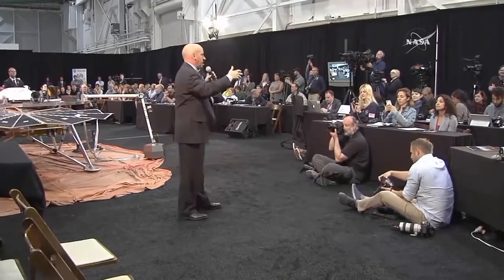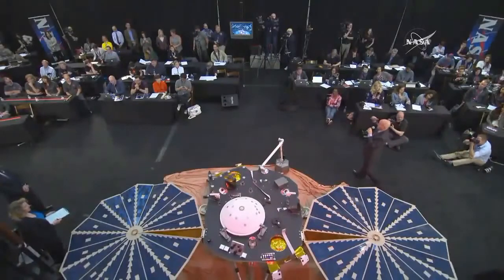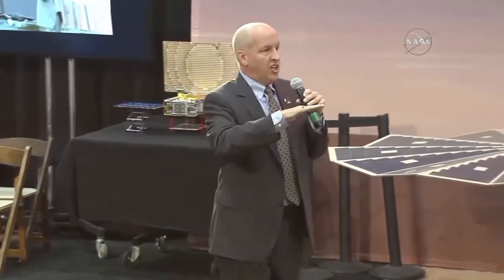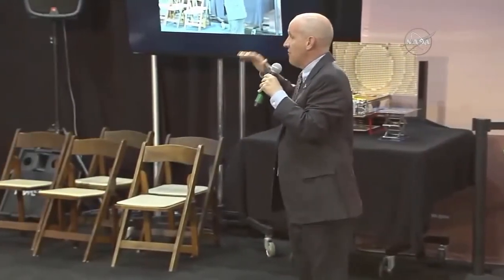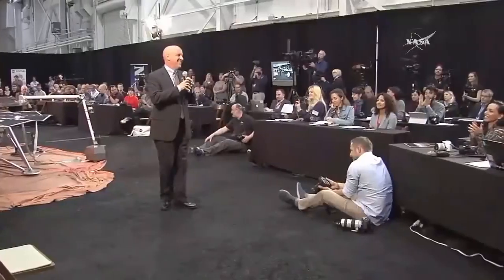So what have we been doing just this week? We did a flight readiness review on Monday. We did a mission dress rehearsal on Tuesday. The entire launch team, all agencies, we are primed and ready. And just this morning, we did the launch readiness review. And we got goes from all aspects, all organizations that have a vested interest in launching InSight. And so we are go for launch. Yes, we are.